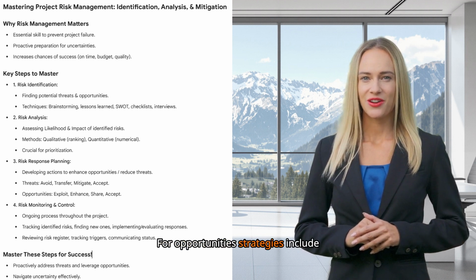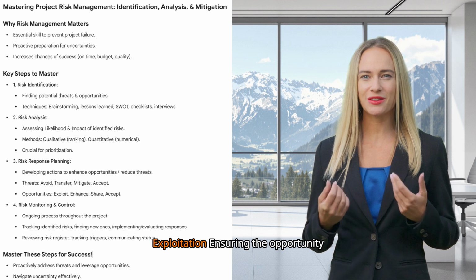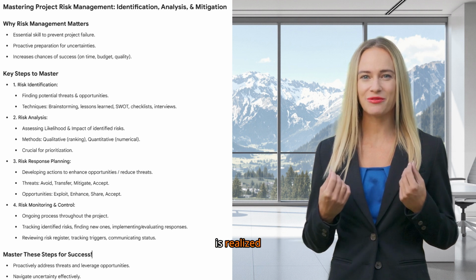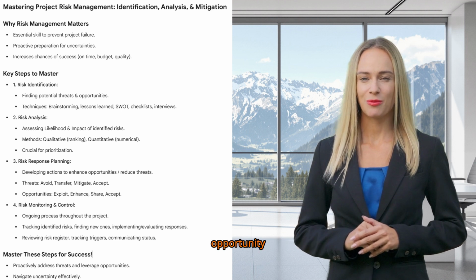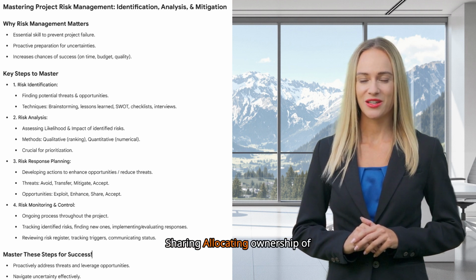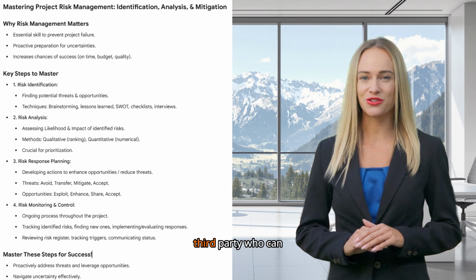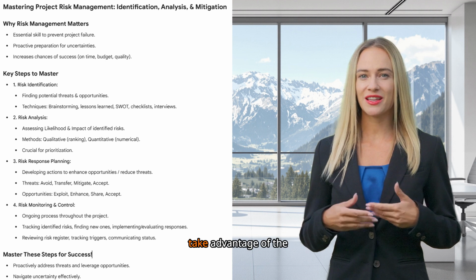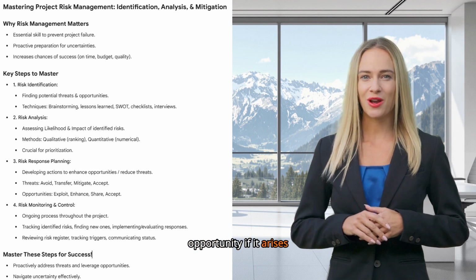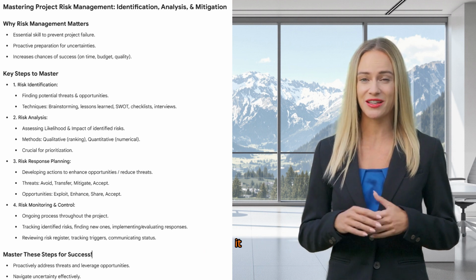For opportunities, strategies include exploitation, ensuring the opportunity is realized. Enhancement, increasing the probability or impact of the opportunity. Sharing, allocating ownership of the opportunity to a third party who can capture the benefit. Acceptance, being willing to take advantage of the opportunity if it arises, but not actively pursuing it.